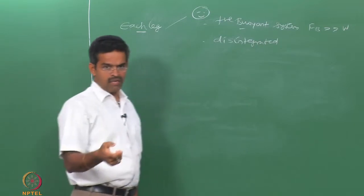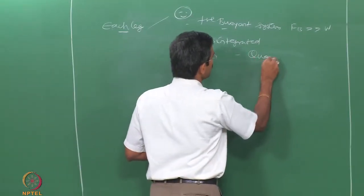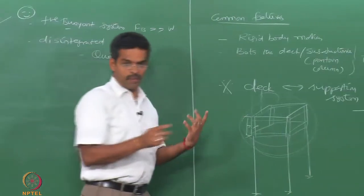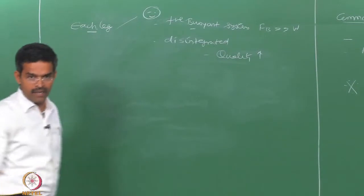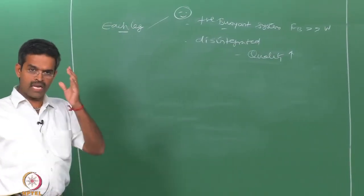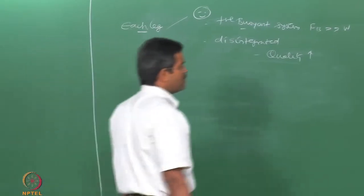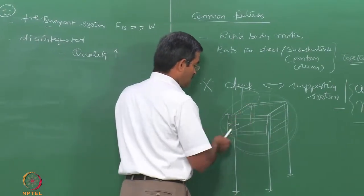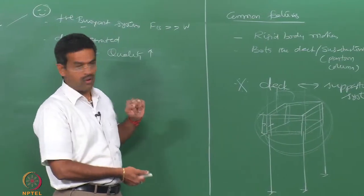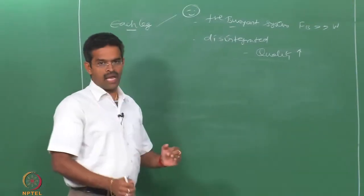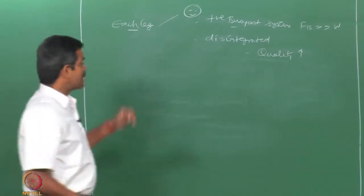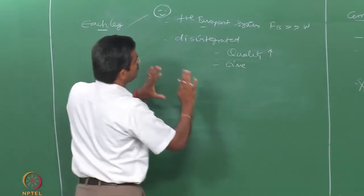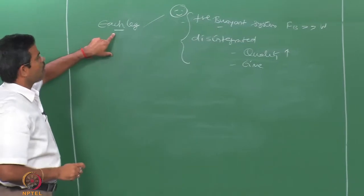Disintegration of design helps in a couple of ways. One, quality control in design can be higher, because you are configuring each element of the platform separately. You can manufacture n number of buoyant legs in parallel because all of them get assembled only at the end product. You need not wait for deck fabrication to wait until column members are fabricated, or column members to wait until pontoon members are fabricated. All components can be manufactured in parallel, giving extreme quality control. However, when this was identified as a major advantage, assembly became a big problem.